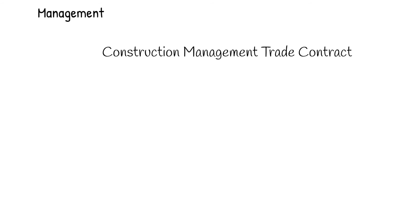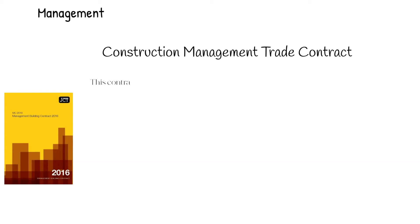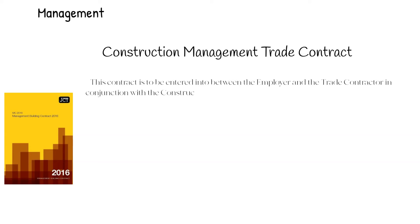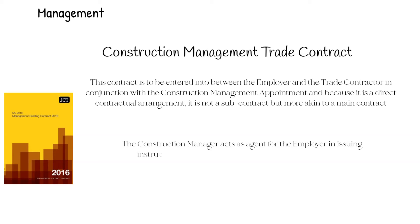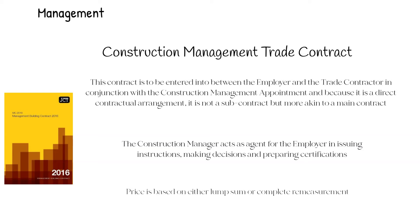Construction Management Trade Contract: This contract is to be entered into between the employer and the trade contractor in conjunction with the construction management appointment. Because it is a direct contractual agreement, it is not classed as a subcontract, but more akin to a main contract. The construction manager acts as an agent for the employer in issuing instructions, making decisions and preparing certifications. Price is based on either lump sum or complete remeasurement. Interim payments are either monthly or at predetermined stages.